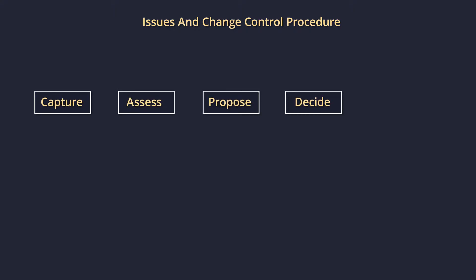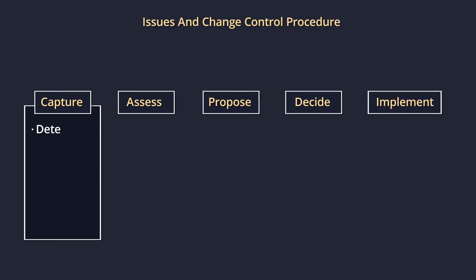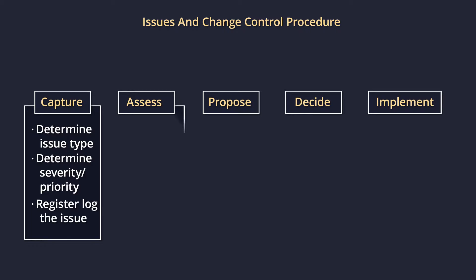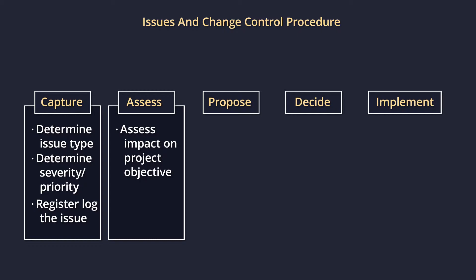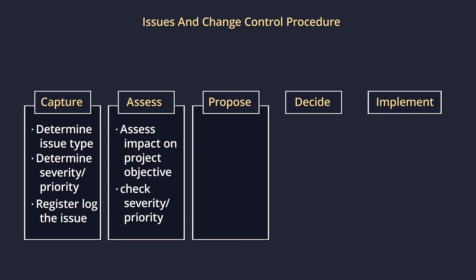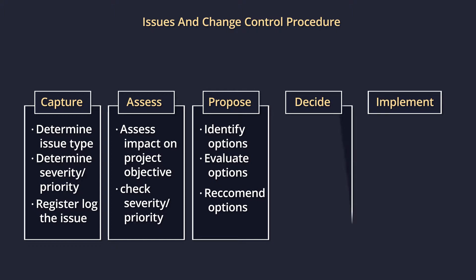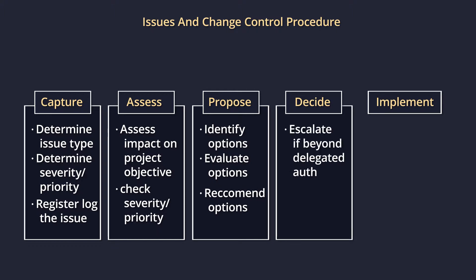The issue and change control procedure has five activities: capture, assess, propose, decide and implement. During the capture step, determine the type of issue and decide if it needs to be managed formally or informally. Issues to be managed formally should be entered in the issue register. The daily log may be used to record issues being managed informally. The purpose of distinguishing between formal and informal management is to ensure decisions are made at an appropriate level within the project management team, and to avoid the project board being inundated with too many issues, reducing the administrative burden on the project manager when dealing with day-to-day issues.